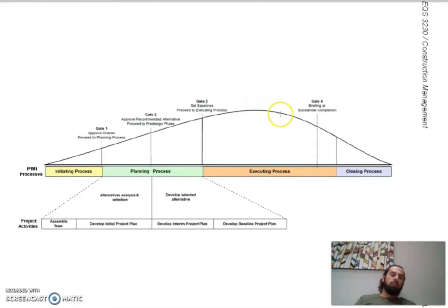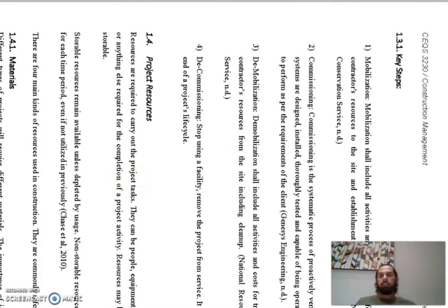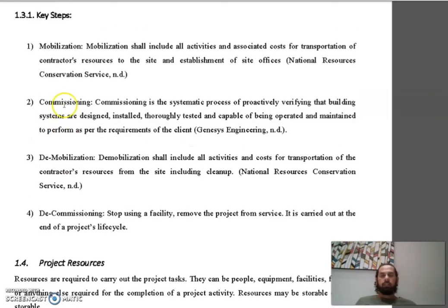Then afterwards, when we are starting to close the project, we do not have that much activity and work. They will start to release the manpower, the subcontractors, and all these things. So they leave one by one, and they terminate those who are not required in this project anymore, until they reach the last point of the project, which means that we don't need any staff or manpower.